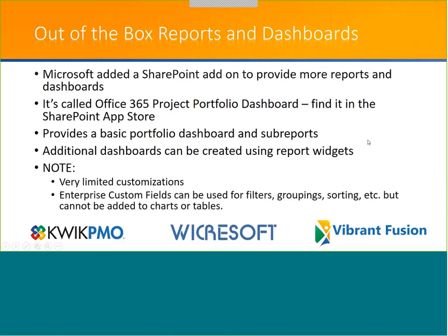Next, we have the out-of-the-box reports and dashboards. Microsoft added a SharePoint add-on to provide more reports and dashboards out of the box for Project Online. It's called the Office 365 Project Portfolio Dashboard. You can find it if you go through the SharePoint App Store. Just keep in mind you're going to have to be an administrator to add it to your PWA. And what it does is it provides an out-of-the-box, basic portfolio dashboard and some sub-reports.